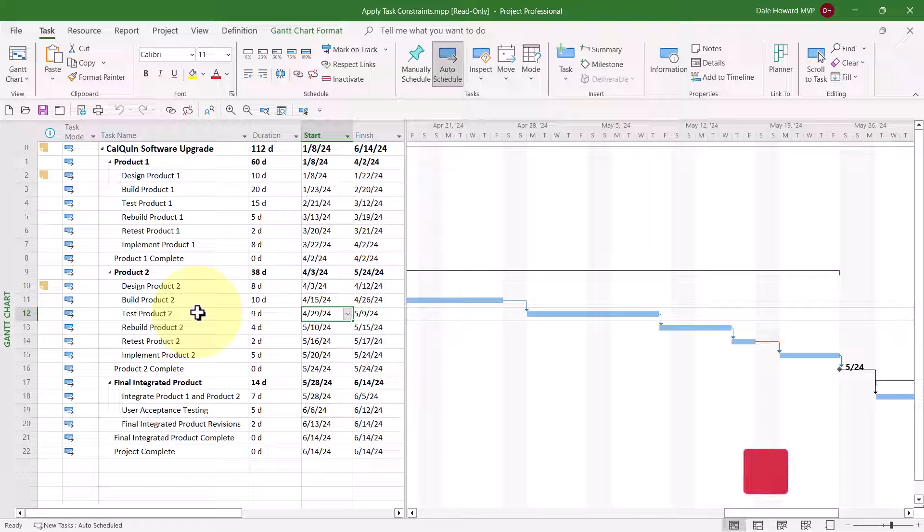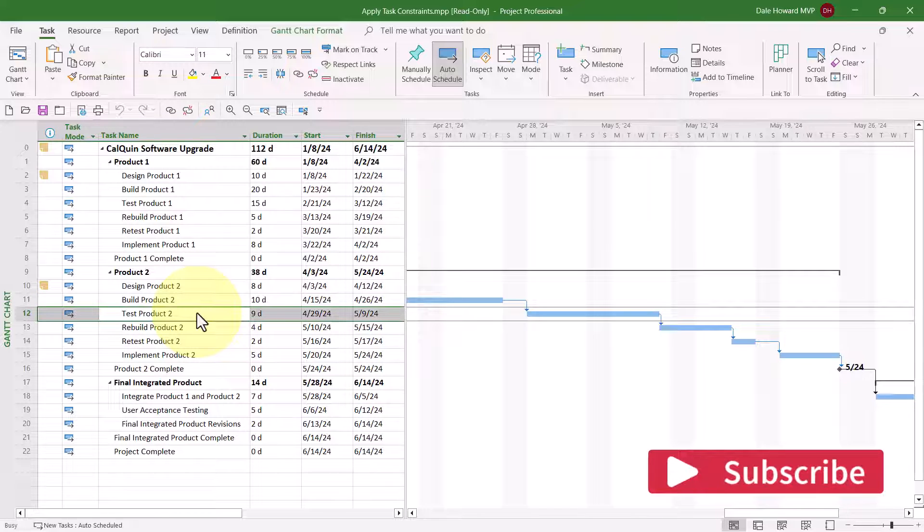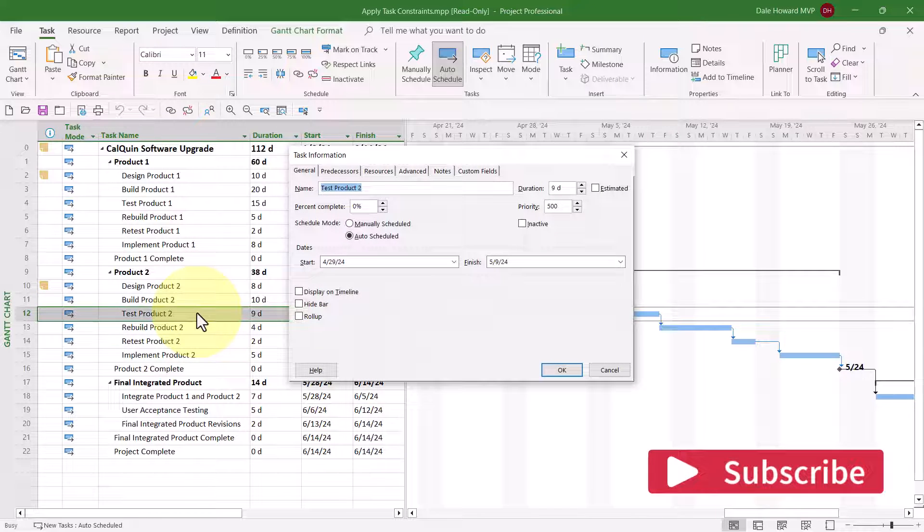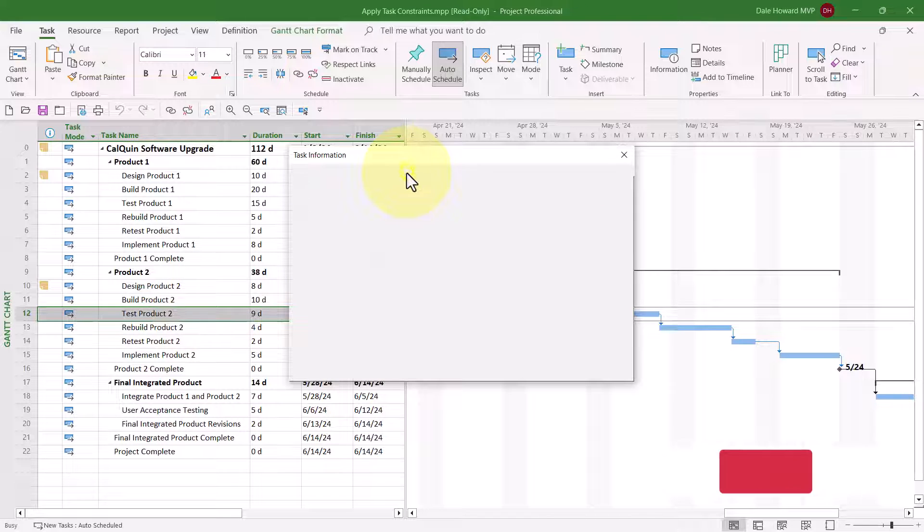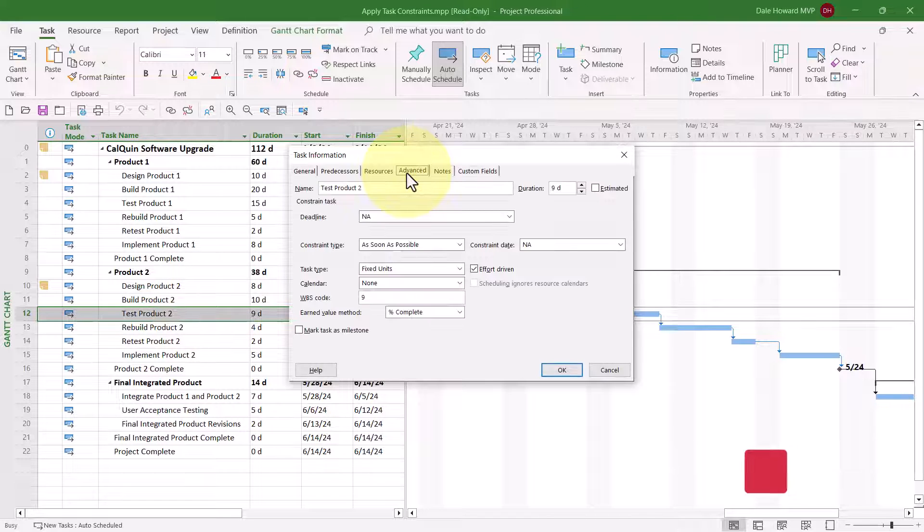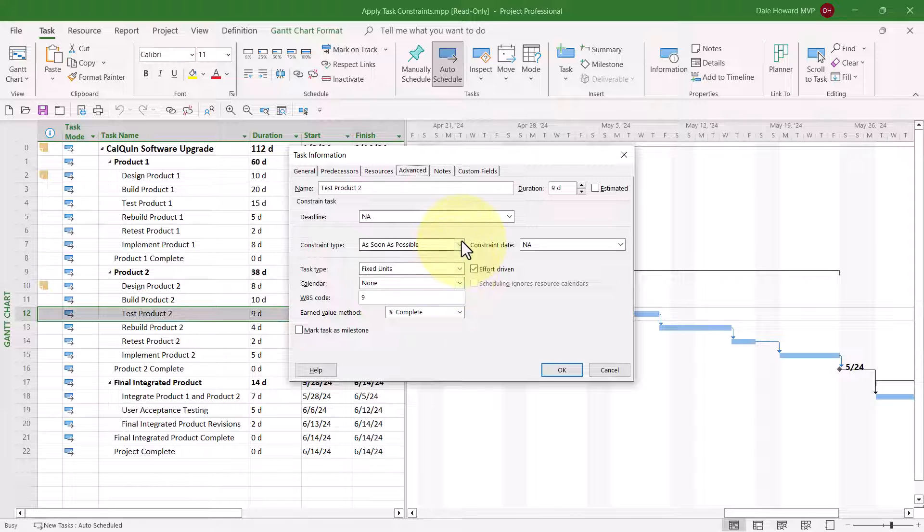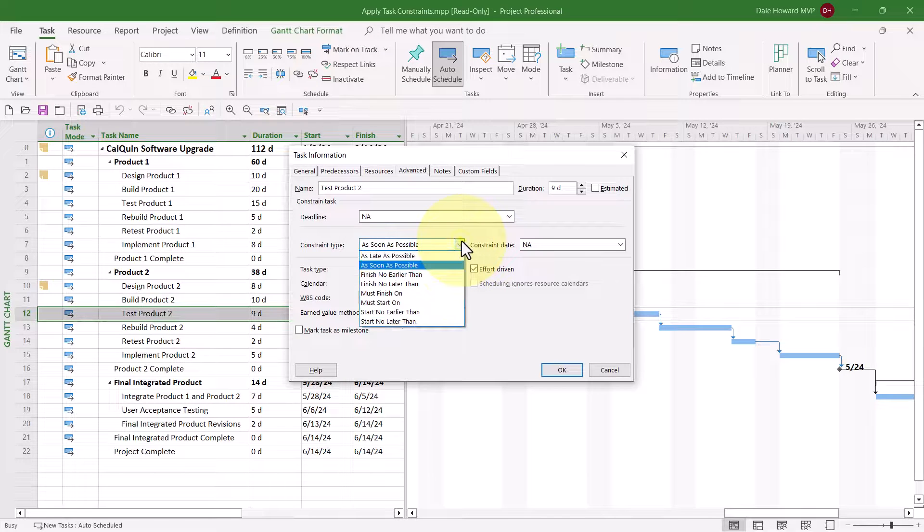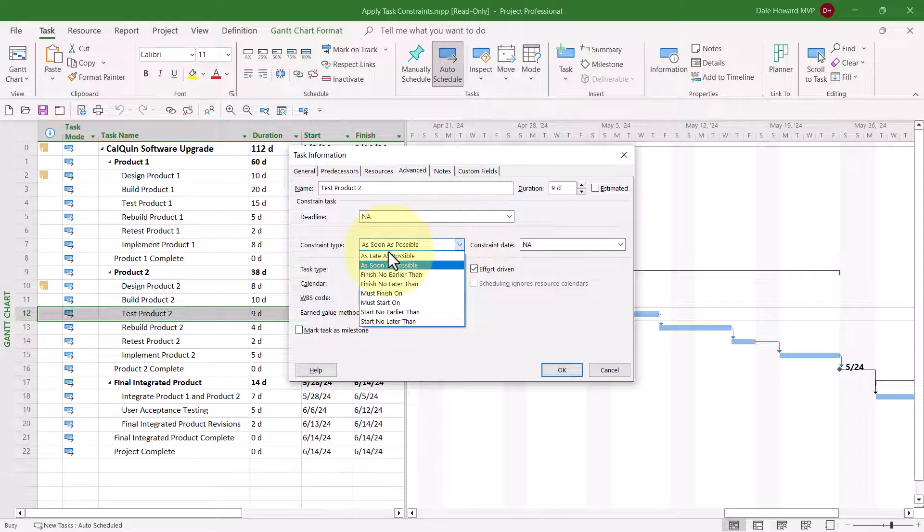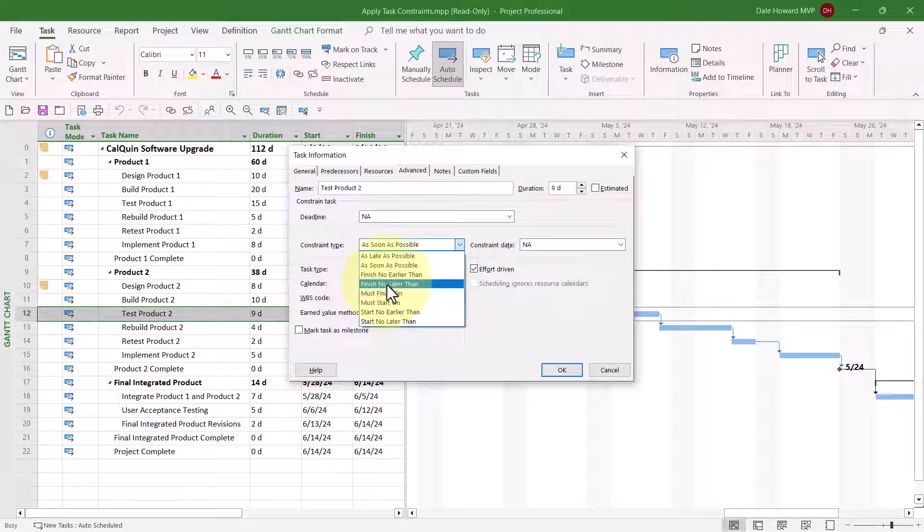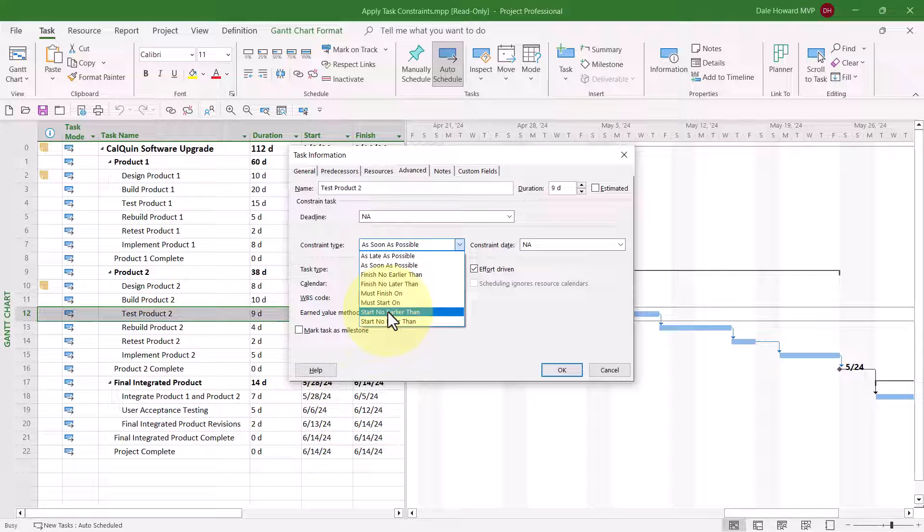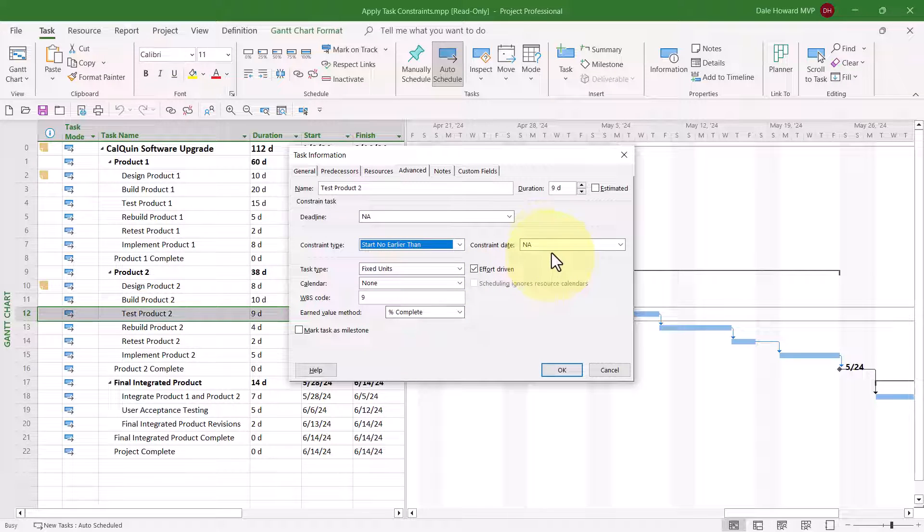So to set a constraint, double-click the task on which you want to set the constraint. Then click the Advanced tab, and on the Advanced page, click the Constraint Type Pick List button. Here are the eight possible constraints from which I can choose. The one I want is Start No Earlier Then.